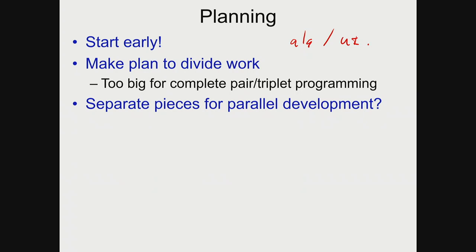Yeah, so it's like stubbing out. In milestone 1, before we had functions written, we just stubbed them out. We just put in an empty function that didn't do anything. So we can use this same kind of idea to test our UI. We can just hard code a path. We can look at the street map data and find a couple of street segments that are connected and say, okay, that's our path, right?